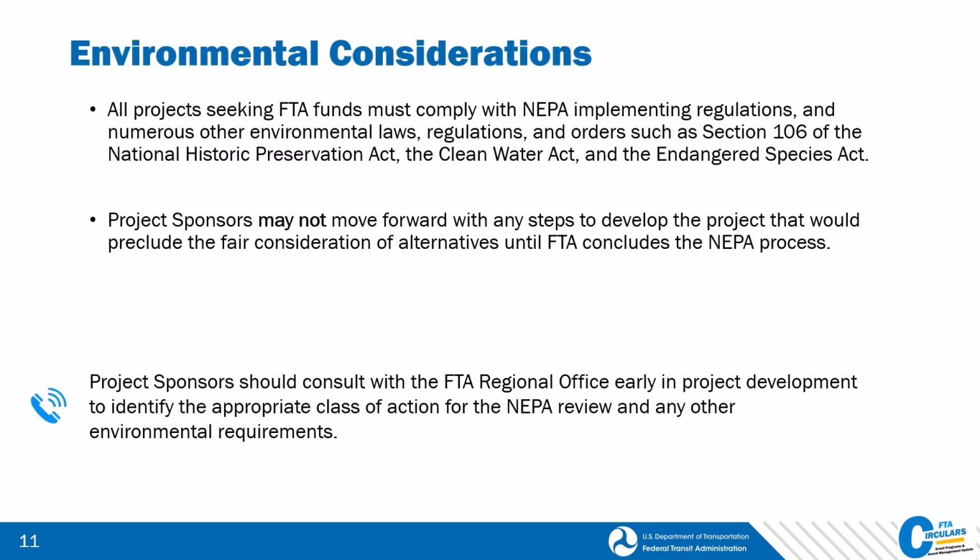All projects seeking FTA financial assistance require compliance with NEPA, implementing regulations, environmental impact and related procedures, efficient environmental reviews for the project, and numerous other environmental laws, regulations, and orders, such as Section 106 of the National Historic Preservation Act, the Clean Water Act, and the Endangered Species Act. Project sponsors should consult with the FTA Regional Office early in project development to identify the appropriate class of action for the NEPA review and any other environmental requirements.